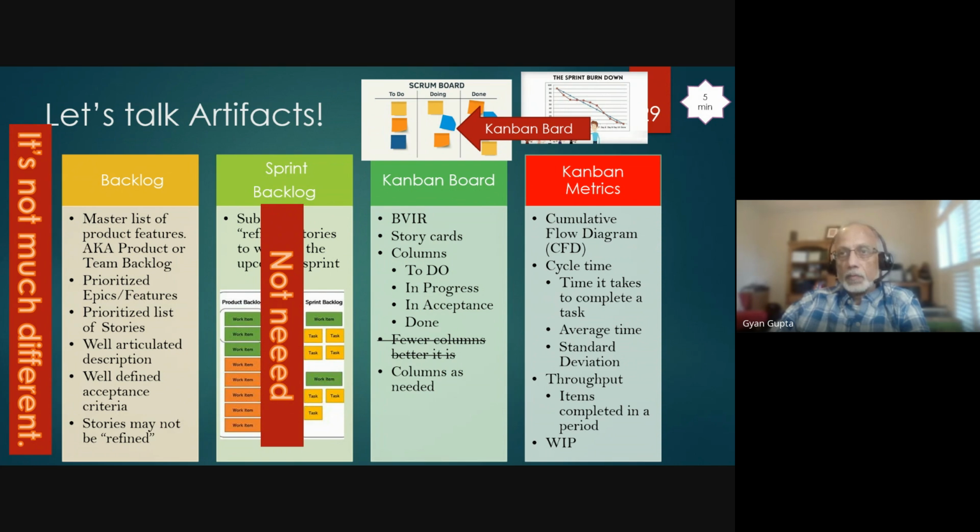WIP is work in progress. So, got a question. Second, technically, when the assembly line is full. Okay. So work in progress: that is each step in a Kanban board, how many work items you can have at a given time. Think about our donut example, when there's a fryer, how many donuts can you put in? If you put way too many donuts to fry, they will not fry right. They create a bottleneck, right?